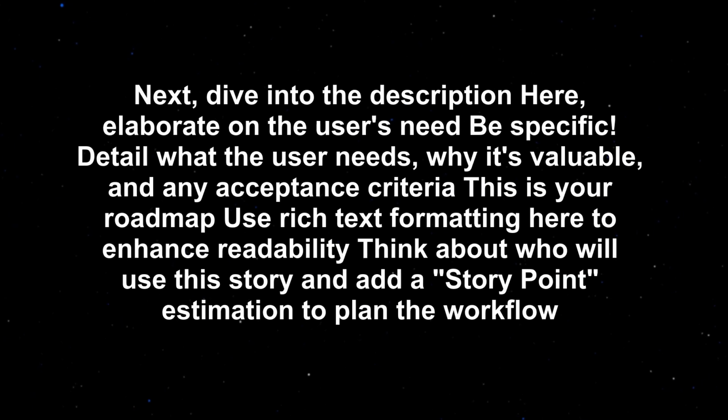Next, dive into the description here. Elaborate on the user's need. Be specific. Detail what the user needs, why it's valuable, and any acceptance criteria. This is your roadmap. Use rich text formatting here to enhance readability. Think about who will use this story and add a story point estimation to plan the workflow.